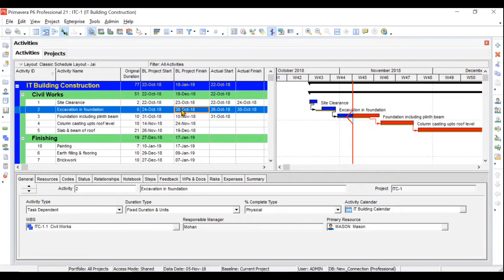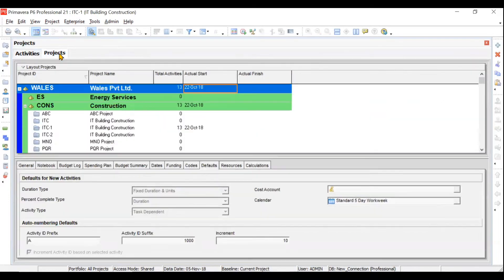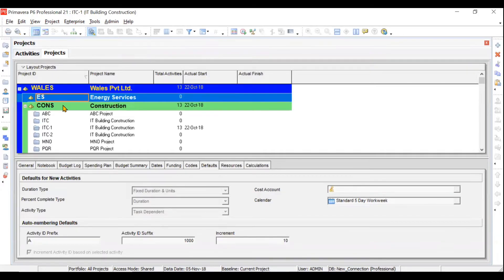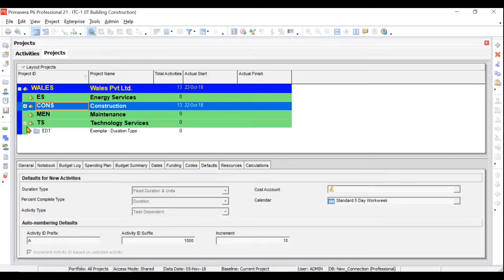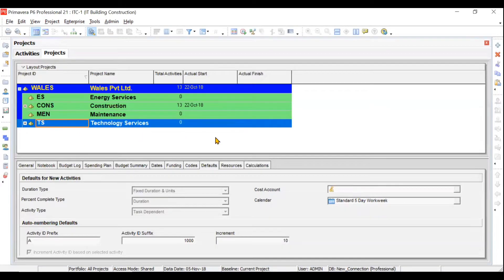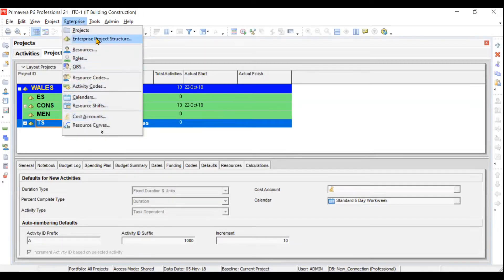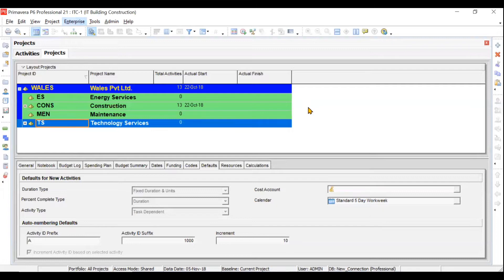Then we will have a video related to EPS — Enterprise Project Structure — which represents the divisions under your particular company. For example, if you have a large company handling projects related to energy services, construction, maintenance, and technology services, that hierarchy of the organization in terms of divisions is called EPS. You can go to Enterprise and then to Enterprise Project Structure to create this.